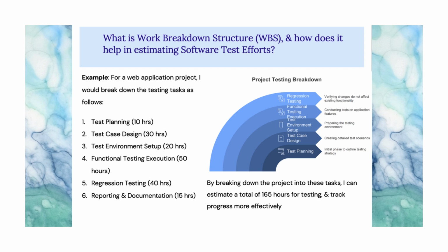For a web application project, I would break down the testing tasks as follows. 1. Test planning, 10 hours. 2. Test case design, 30 hours. 3. Test environment setup, 20 hours. 4. Functional testing execution, 50 hours.